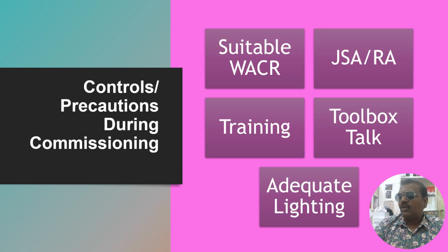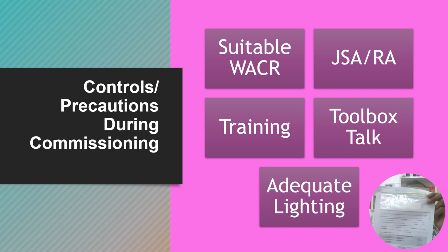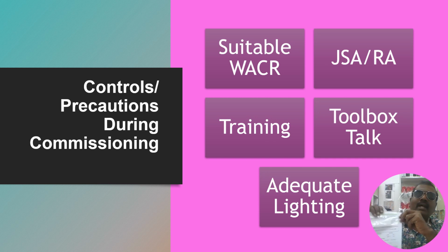So the second thing, what is this? Suitable WACR. What is this called, WACR? This WACR means work authorization clearance request. In other projects, you may have heard of PTW, permit to work system. Here we use the name WACR like this, in short. What is this? A document.